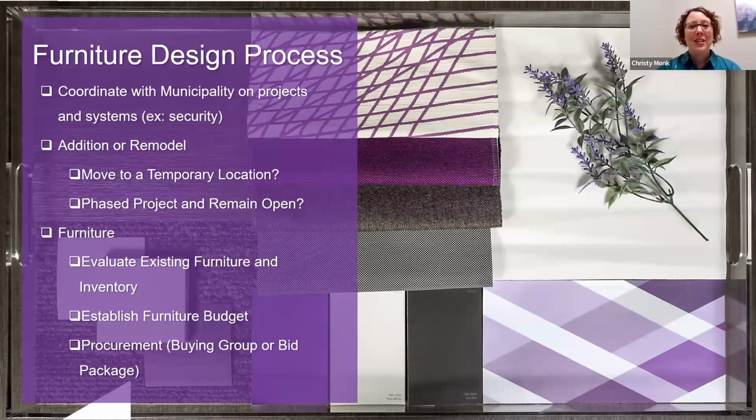Don't forget about the furniture. So we built this building and we have to put stuff in it. So furniture design really follows its own timeline, separate from the building, in the sense that the decisions that need to be made on furniture really aren't usually part of the same bid package of construction that goes out to actually build whatever it is that you're doing out of bricks and mortar.